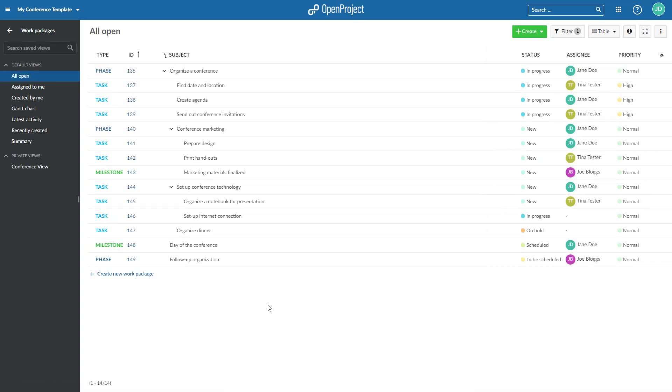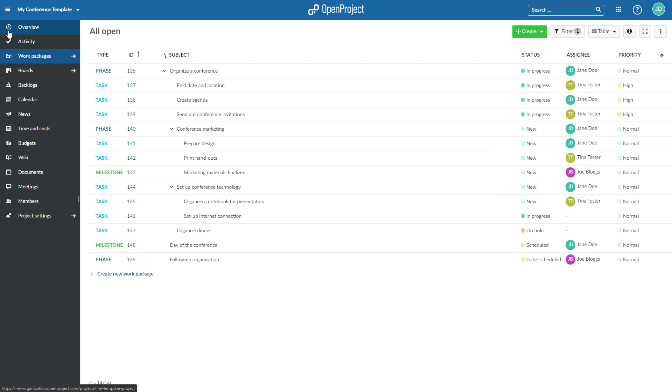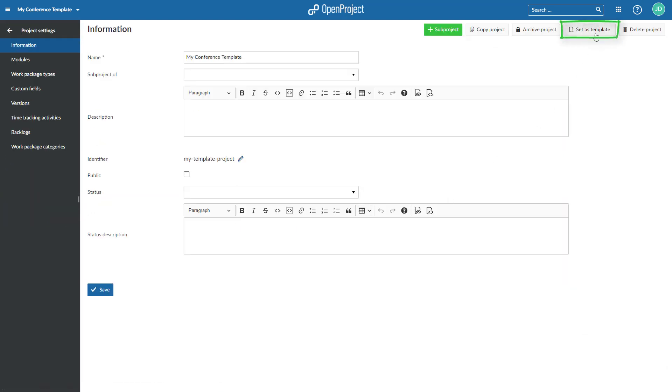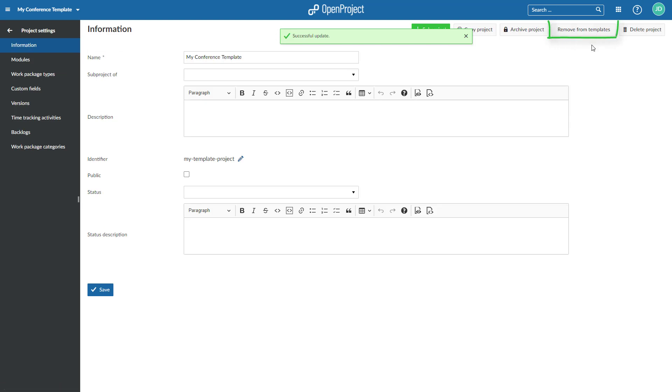Navigate to the project settings and click Set as Template in the upper right corner. You can remove a project from the template collection at the same place. The option to set a project as template or to remove it from templates is only available for administrators.